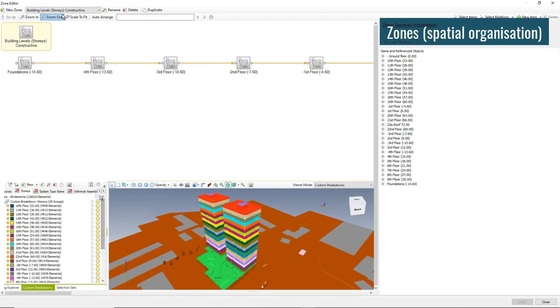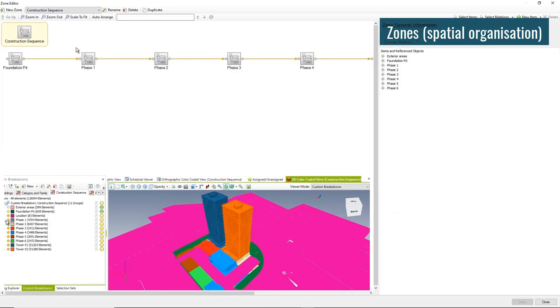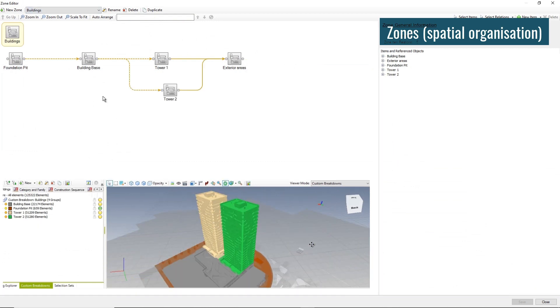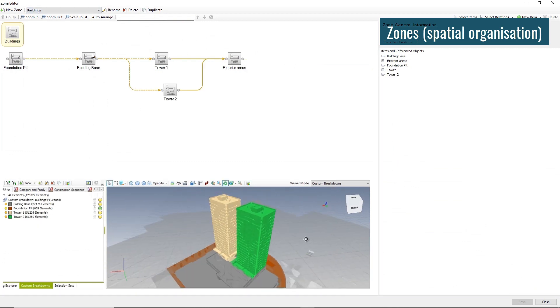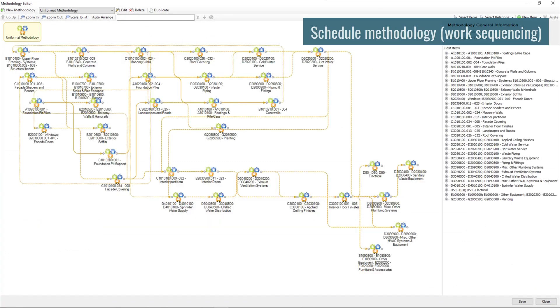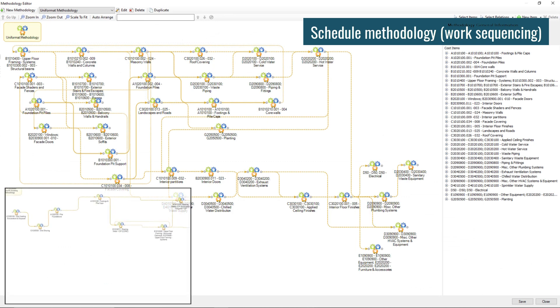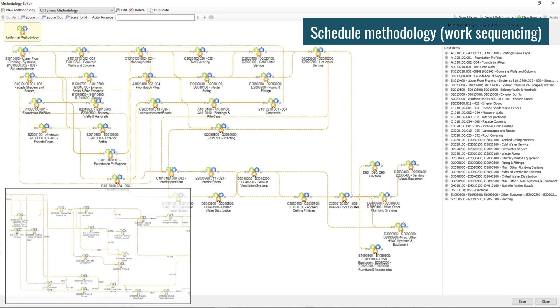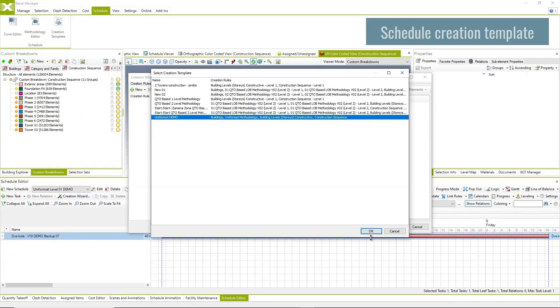Define project zones, spatial organization of the project, and their relations. Import or create construction methodology connected to BIM classification with all defined relations.